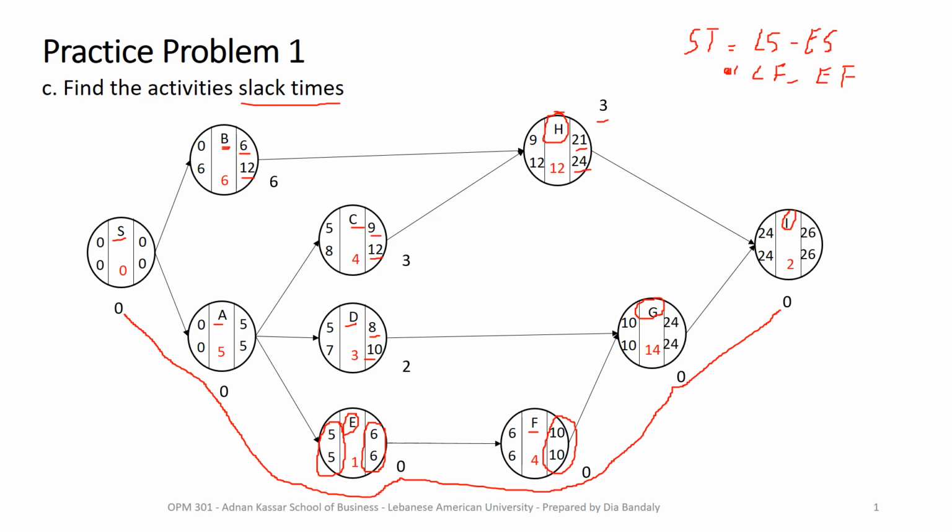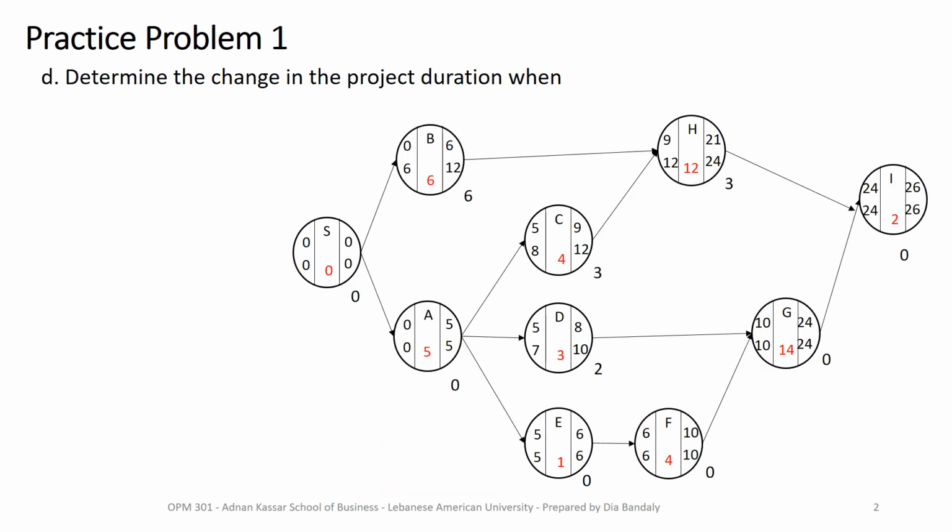is our critical path. Okay, and this is another way, as explained to you earlier, when we have thousands of activities, project management or project scheduling softwares, or the algorithms that are built in, find these values and can then easily recognize the critical path by finding a path that consists of all activities with 0 slack. Okay. All right, finally, this is our last question in this problem.